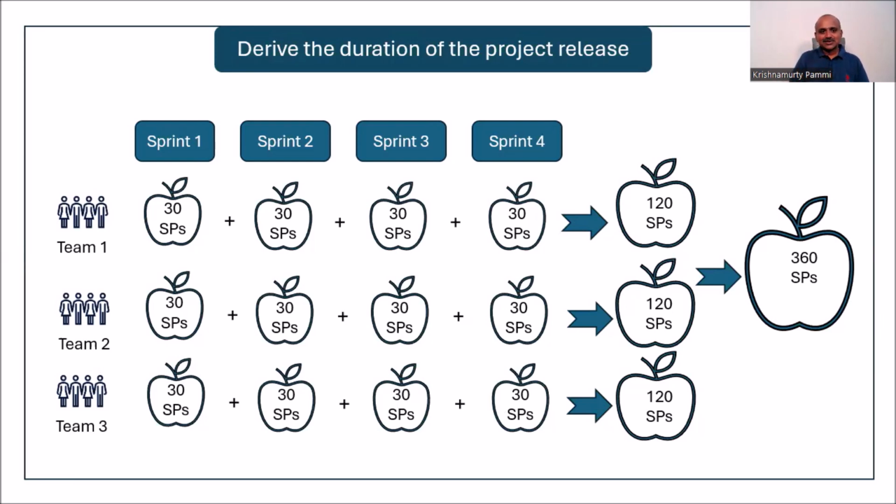You can do that as well. I have 360 story points worth of capacity with me. How much of the product backlog is ready? So far, 90 story points are ready. That means around 270 story points are not yet groomed. So how can I start the project? This is where you turn the project into the right dimension. Otherwise, with many assumptions, you end up taking the load and keep going, and ultimately we will be penalized. No, the right person should do the right work at the right time.